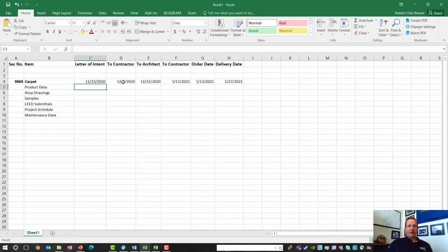Okay, that was kind of rough. Let me say that again. The subcontractor will begin putting together submittals once you give them the letter of intent. And then you'll work on their contract, and hopefully you'll have the contract in place before they need to order it, because they may not order materials based on a letter of intent. They may need a contract before they order materials.